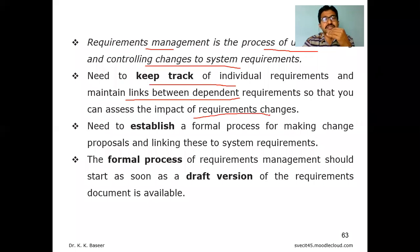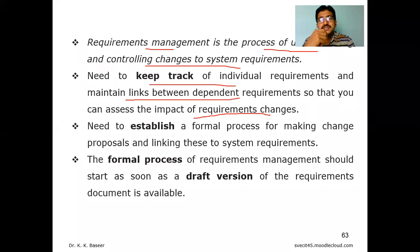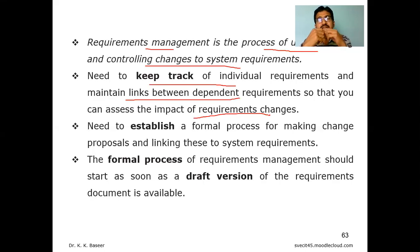The manager must also keep track of individual requirements and maintain links between dependent requirements so that the impact of requirement changes can be assessed. For example, in a project with three modules, some partial requirements used in module one can also be used for module three. So you can easily map requirements when you keep track of all of them.